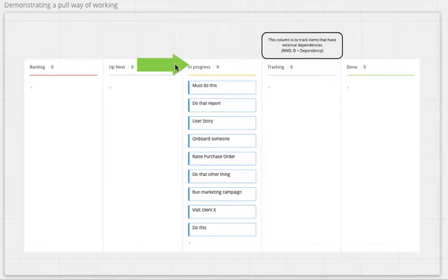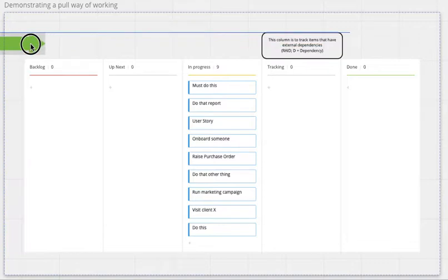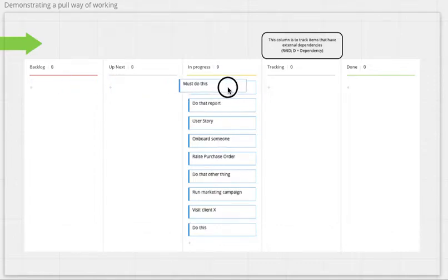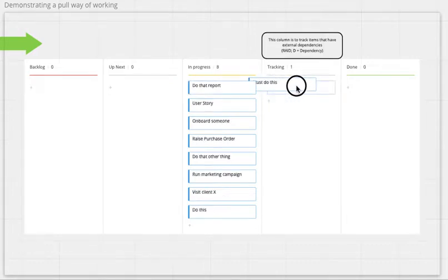And the third thing is what you can actually do to predict future delivery is you can measure how long it takes a work item from when it leaves that first column and begins its journey. So it's in progress towards the done column, and the time it arrives, the date it arrives. And that's called cycle time. And you can measure that.